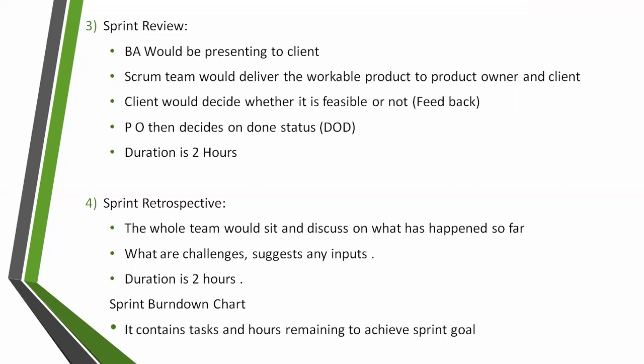It might last only for 15 minutes or half an hour also. Why? Because from the past 10 days, whatever work we have done, we are just showcasing it to the client. After your review is done, the client would be giving you a sign off, whether it is feasible or not. Sometimes the client would say, no, it is not at all appreciated, why can't we move ahead with some more features?